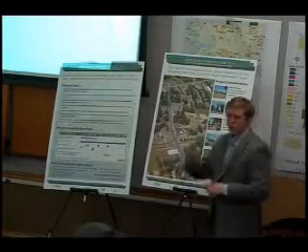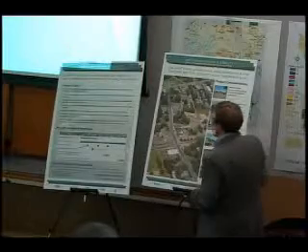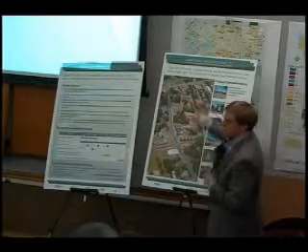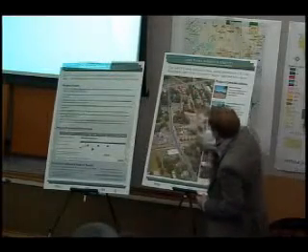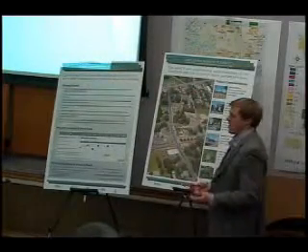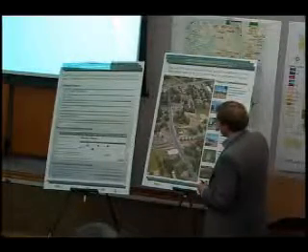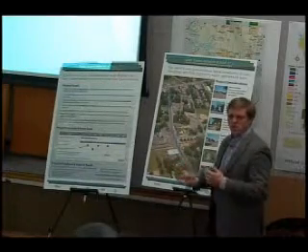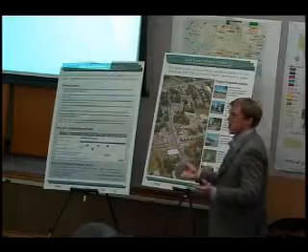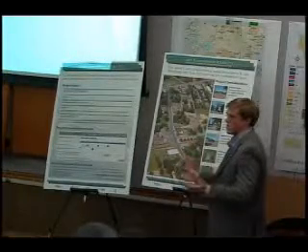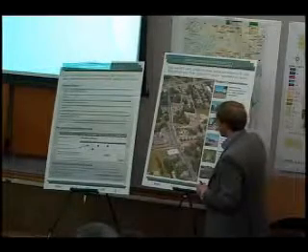So those three main entities are the main three driving forces behind this project. So what does that mean? What is the county's responsibility and what is the city's responsibility? Well, the county owns Lake Elmo Avenue, so that's their primary area of interest and where their dollars are going to flow. So all of the other ancillary things that we're looking at doing as part of the project, such as this, because this is really a good opportunity to do a streetscape improvement in a downtown area, as well as extension of sanitary sewer.